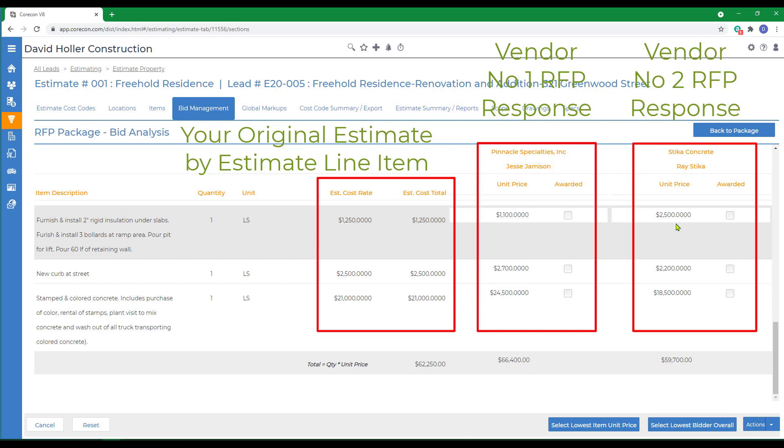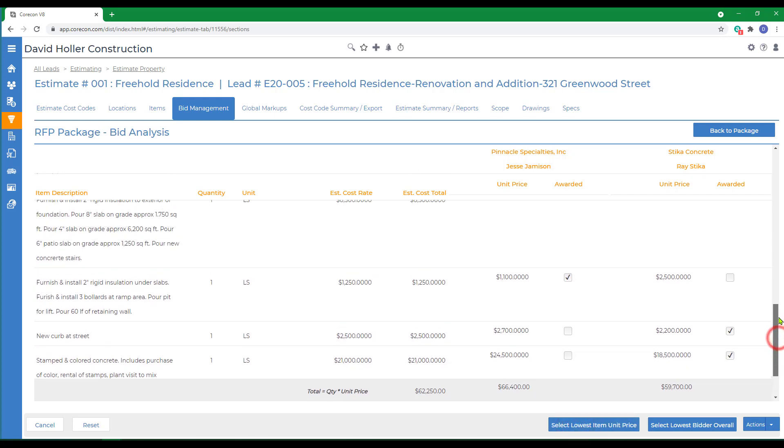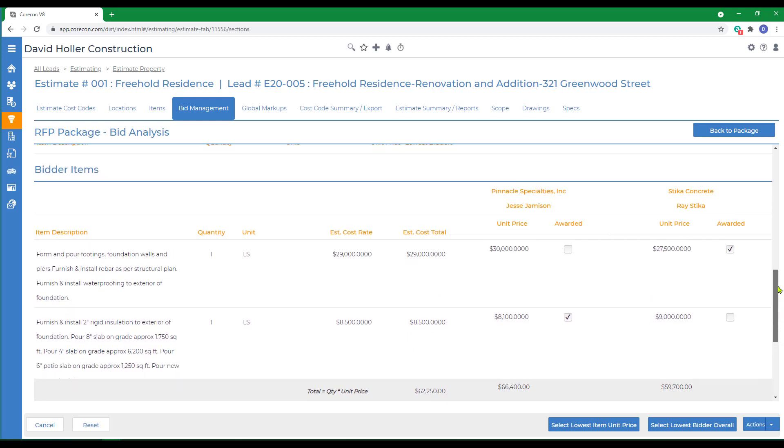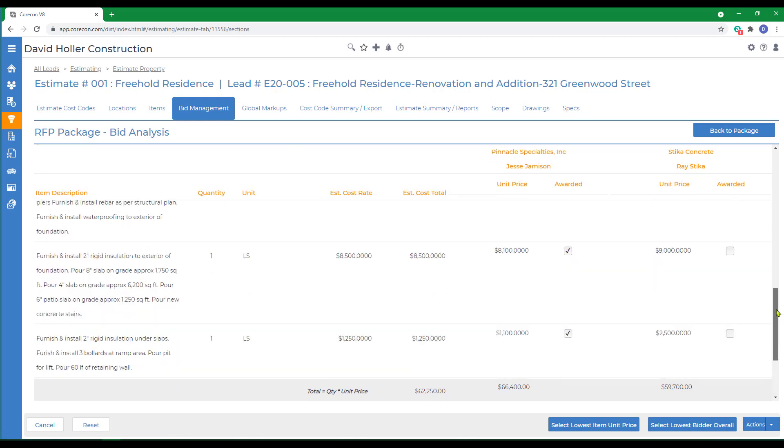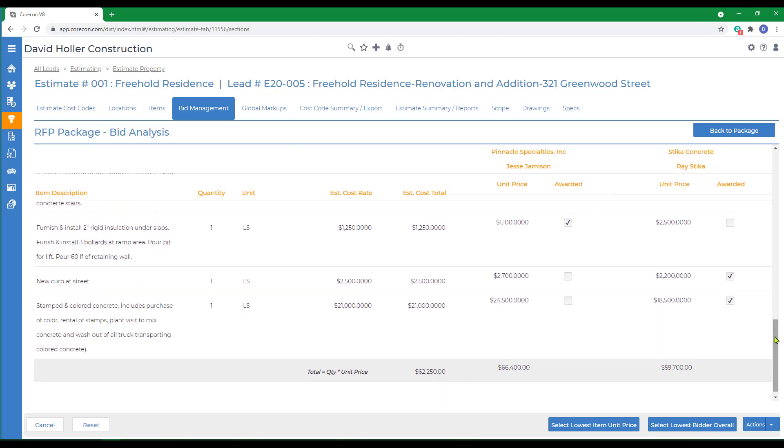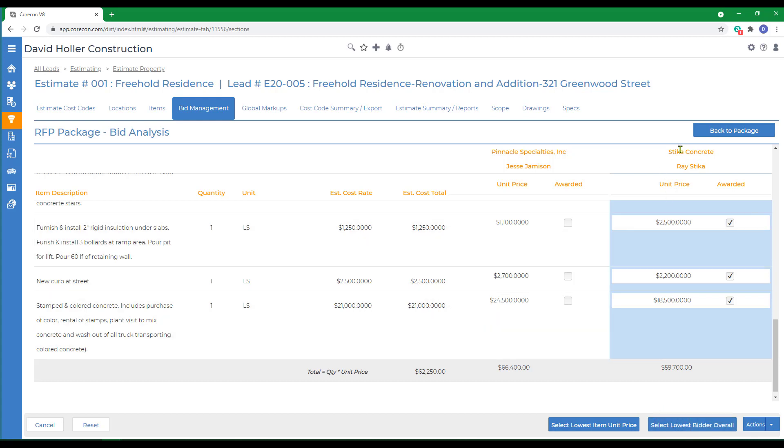You have the option to select the lowest item, but in this case, that might not be practical since some of the items are higher and lower and spread across two different subcontractors. So I'm going to select the lowest bidder overall, and that's going to be Ray Stika at Stika Concrete.